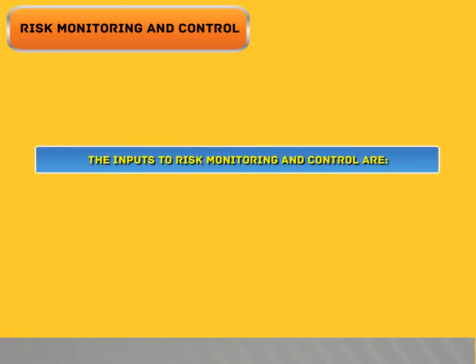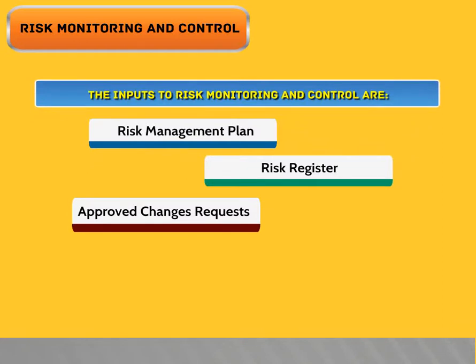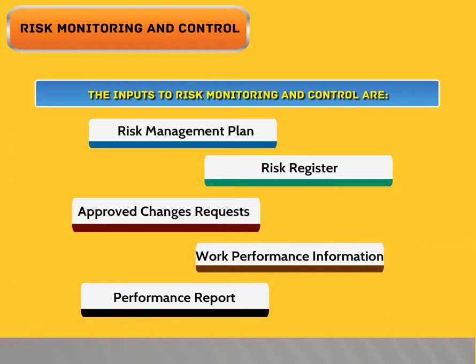The inputs to risk monitoring and control are risk management plan, risk register, approved change requests, work performance information, performance report.